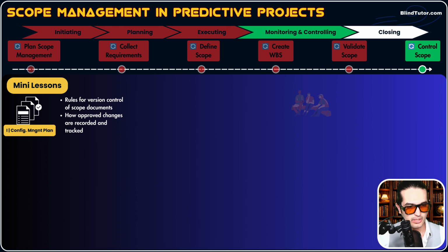Okay. Now, let's say our stakeholder requested a change to the scope. And then you evaluated that change and did the assessment, found the change's impact on scope, schedule, cost, and then you presented all the information to the CCB, and the CCB approved that request. Now, what's your first action? You need to update the scope baseline because it's a scope change, okay?